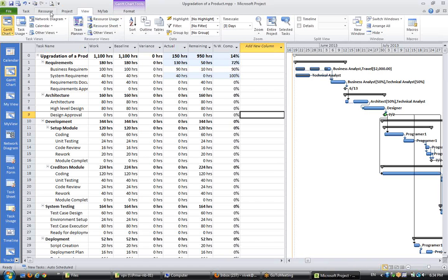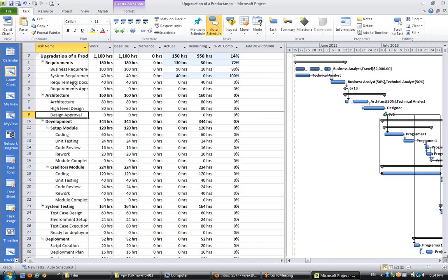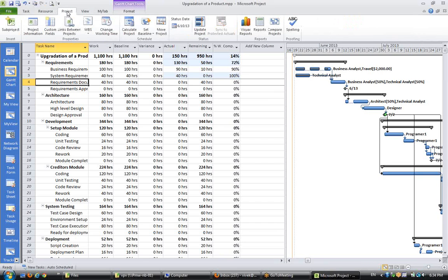And that's the drawback with this approach, that it does not give us any variance. It just gives us how much we have completed. If that is good for you, you can use this method and go ahead. But if measuring the variance is important, you cannot do so.